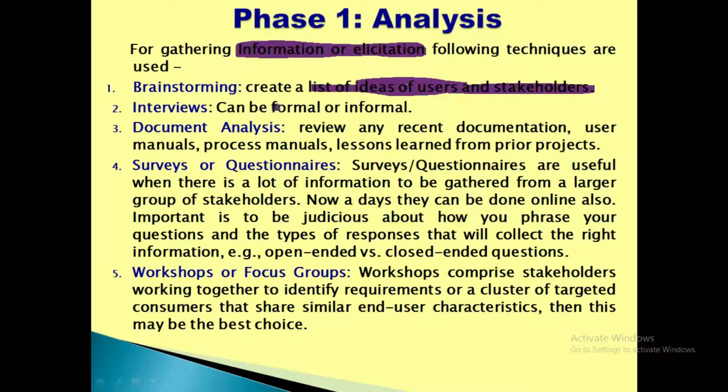Interviews, they can be formal or informal interviews. Document analysis: basically they try to review any of the recent documents which are already available. All the user manuals, process manuals and prior project reports, they can analyze them, observe them, study them and come out of it with some ideas.